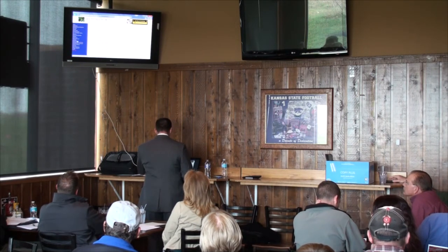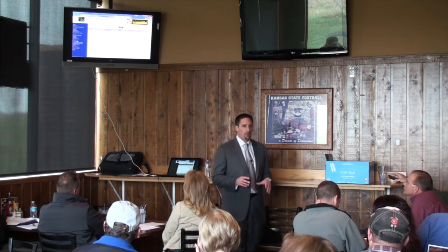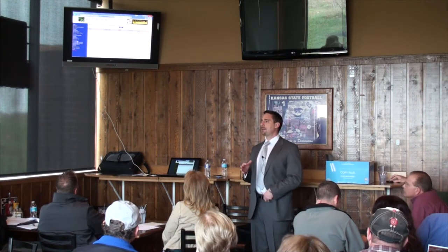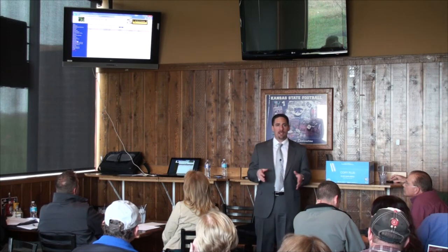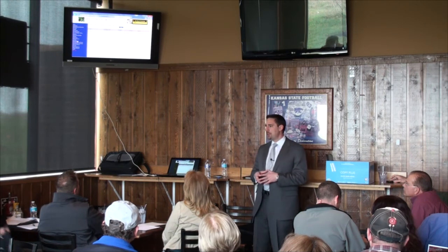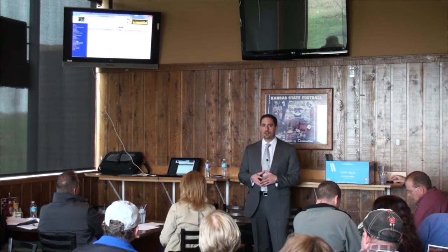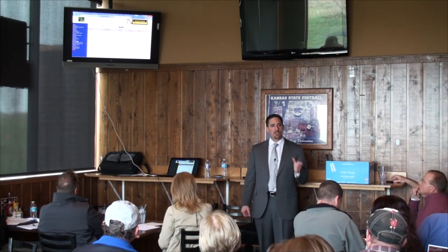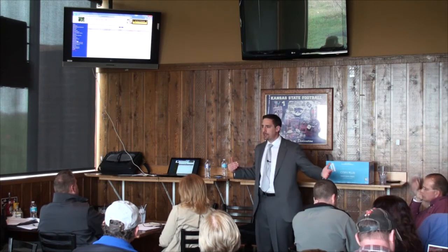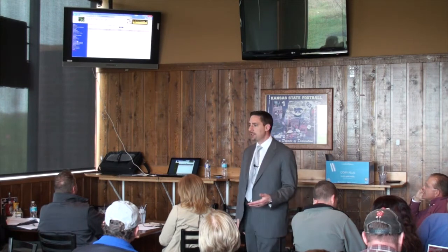Somebody asked a question about change orders earlier. So when the designers meet with the buyers, they select options. Options make changes to the base house. The way that we look at the change of the base house in total, in scope, is by change order. A change order is a 3-digit number. Under that change order number, you may have one or many options that the buyer has selected for ratification to put on the house that affect each and every one of you.